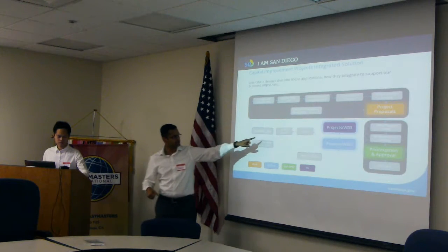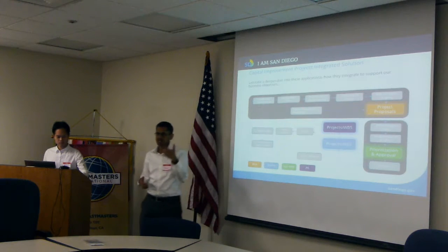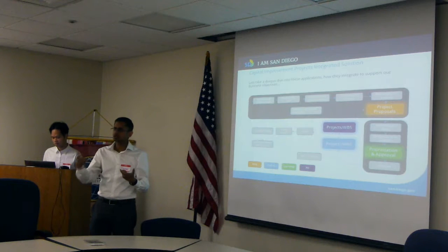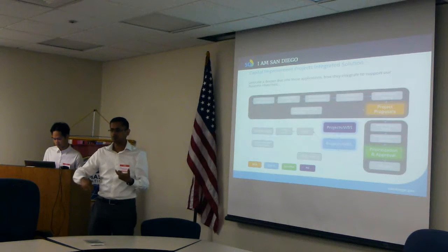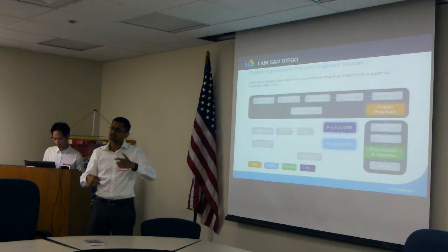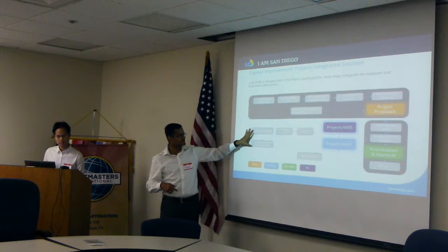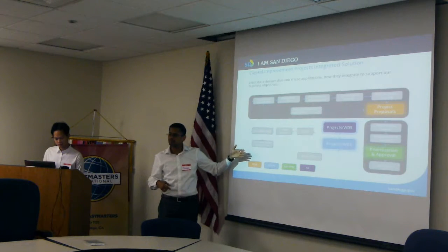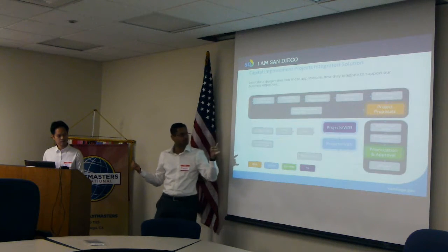And this data, the work that we've done, is fed back into Riva, so that Riva now knows for this FSN number what was the new work that was done, and how long has the lifespan of this asset improved, or what's the new condition data that it should take to go ahead and calculate the risk score of not replacing the asset, or when should this asset be repaired in future. Right? The condition data and the technical asset data is what is called asset master data, which we feed back into Riva. So this is another topic that I will be taking you through the next slide.